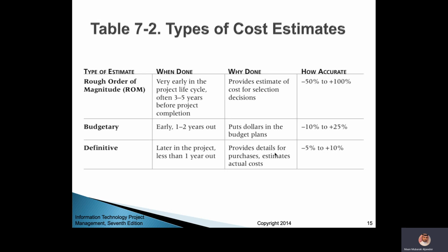You need to pay an extra 5%, the VAT. So this will increase your budget for this item by 5%. And this is the accuracy that we are talking about. So there might be some differences, but it didn't exceed 10%, 5% only.